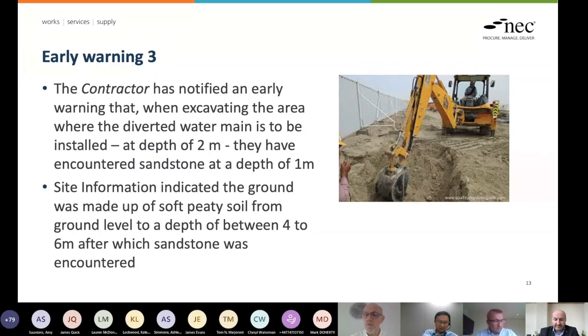Well, it's not at the moment, I would say, Paul, but we can sort that out. Yeah, I think from the project manager's perspective, I'd be happy to look at maybe issuing an instruction here to the contractor that the contractor can then obviously pass on to the subcontractor to cover. Yeah, it's not within the scope at the moment.